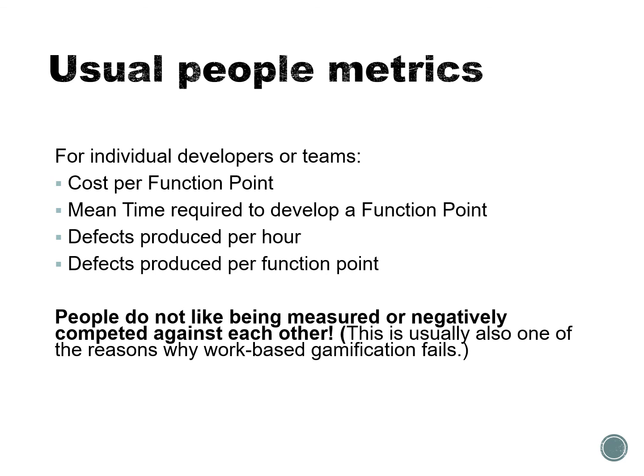Of course, if we use function points as a basis, then how much does it cost to create one function point? How much time does it require to develop a function point? How many defects were caused by that? And how many defects were produced by a function point if we are extending the original function point approach? But like I mentioned earlier, people do not like being measured or negatively competed against each other.